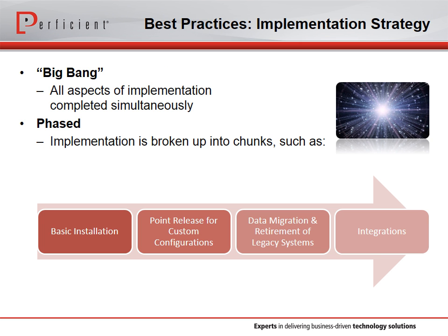So once you've selected your system and your implementation option, it's time to determine your implementation strategy. For implementations that involve anything beyond using the system out of the box, there's always the question of big bang or phased approach. The big bang approach is enticing because it means you get everything you need all at once, but it also means a large upfront investment, and also there's a longer waiting period before your end users get to use the system.